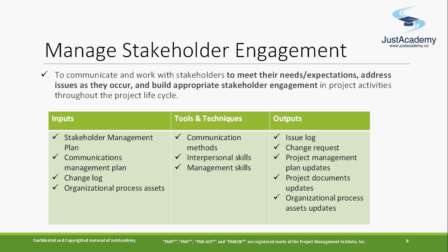Now, for the engagement strategy, with a few stakeholders you may have a daily meeting, with a few stakeholders maybe just a presentation, and with a few stakeholders you just drop a mail to update them on the project. So you're going to have a different strategy for different people, and this is where communication management comes into the picture, because you can use a communication method for that. That's why one of the tools and techniques is communication method. You can use the communication method for engaging the stakeholder.